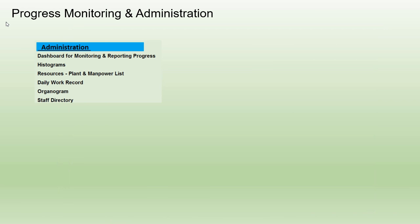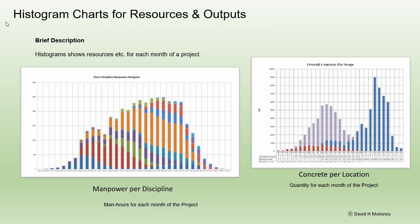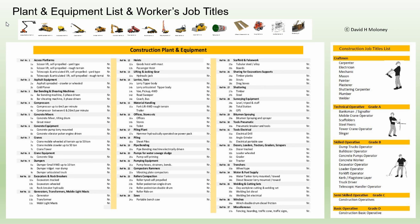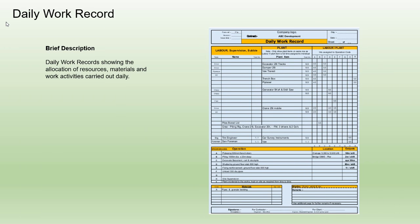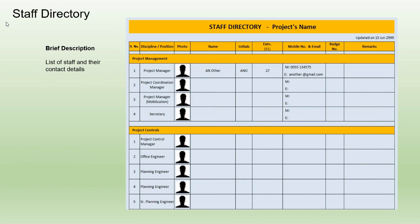Administration. A progress dashboard is used for monitoring and reporting. Histograms show resources and outputs for each month of a project. Resources, plant, and manpower lists, and daily work records are maintained. An organogram shows the line and lateral relationships between the various team members and their relative positions in the site organization. A staff directory is also provided.